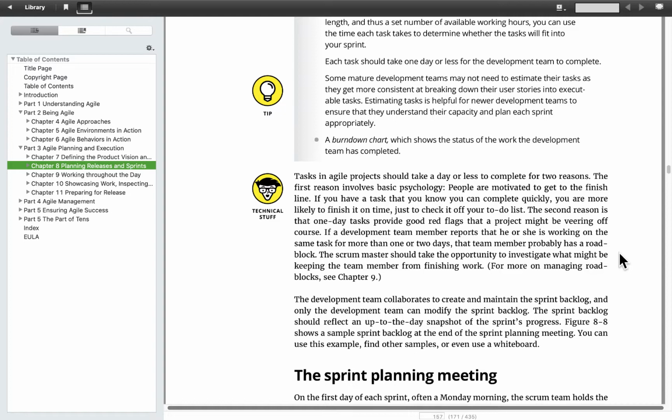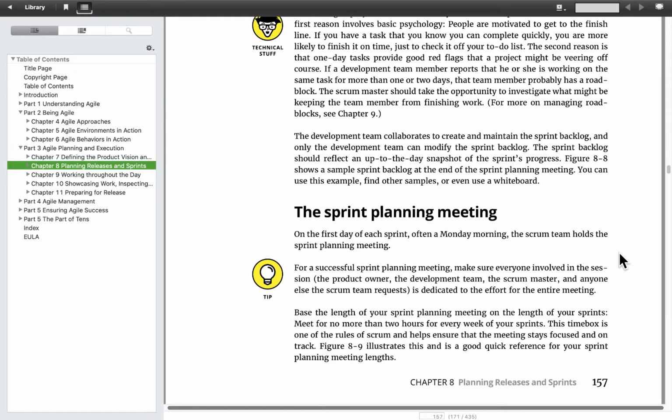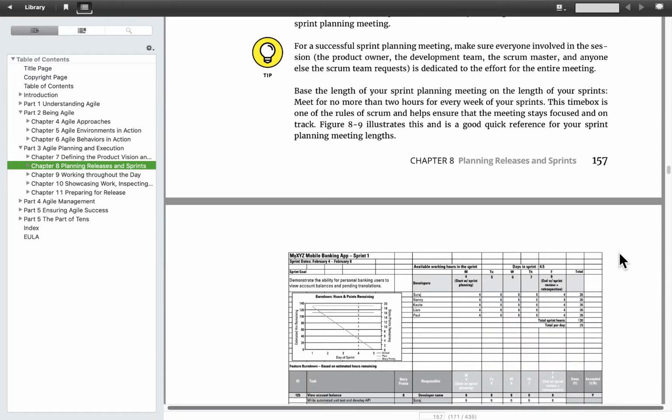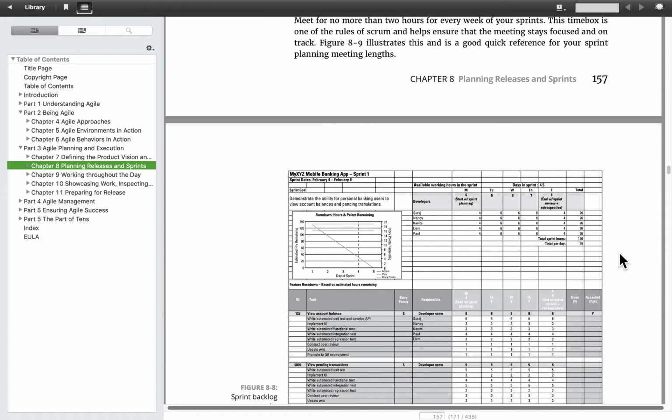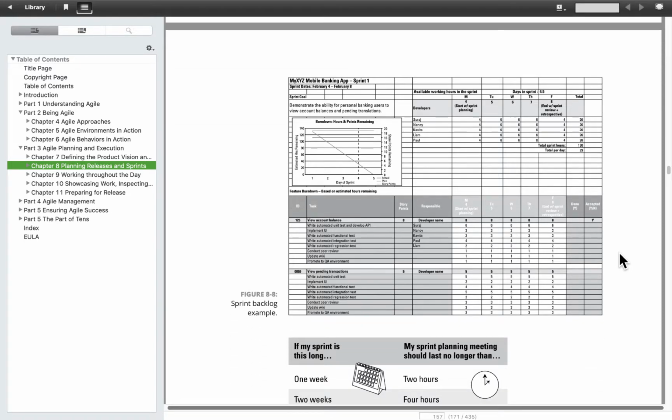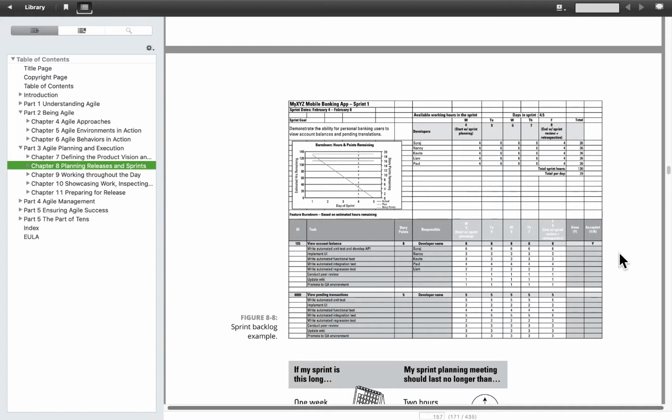They have some versions of it in the book here where we've converted it to person hours and we're burning that down. I think that's a complexity that, again, we're not going to need in our class, so we're not going to do it. The sprint planning meeting takes a half a day or less. And again, you're picking the stuff that goes into the sprint, user stories and tasks that are non functional requirements.